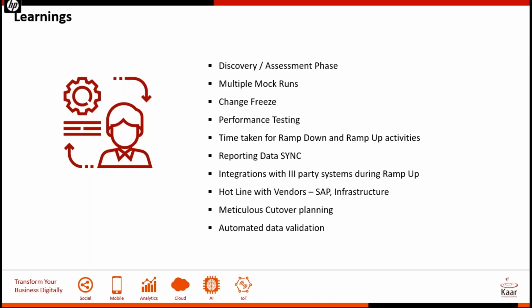But then what are the key learnings that we have had in our last couple of conversion customers that we would like to bring to the table to discuss, that would help other customers to do this in a less cumbersome way? The first one, I cannot stress enough, is the discovery or the assessment phase. Like I said earlier, do the discovery and assessment phase well ahead of time, possibly 3 months before you really start your project. Get all the information, get enabled, know what you're getting into, and there are certain tasks from the pre-checks that you run ahead of time.